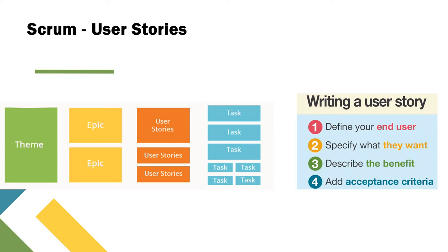So user stories came into existence for the product features. A user story is from the user perspective, regarding what he or she wants to have rather than what the system can do for him. Thus the view changed from the product to the user completely. User stories became a standard for requirements in all agile frameworks. In Scrum projects, the product backlog is a list of user stories, and the size of the product is estimated in user story points.